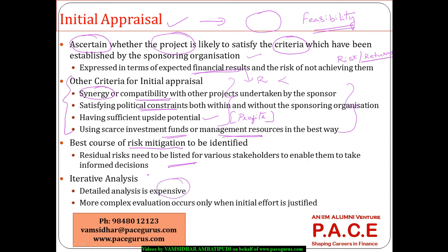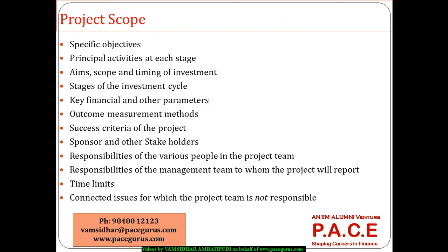Because it's very expensive, generally it is done in an iterative manner. So a quick initial appraisal is performed, and only when the quick initial appraisal is satisfactory and the effort is justified, then we go ahead with the more and more advanced complex evaluation mechanisms.